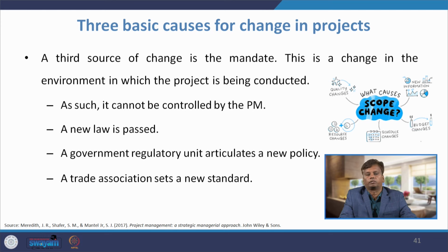And the third source of change is the mandate. This is a change in the environment in which the project is being conducted. As such, it cannot be controlled by the project manager. Some reasons for change: a new law has passed, then we have to change the project objective. The government regulatory unit articulates a new policy, then we have to change the project. A trade association sets a new standard, then we have to change the project.